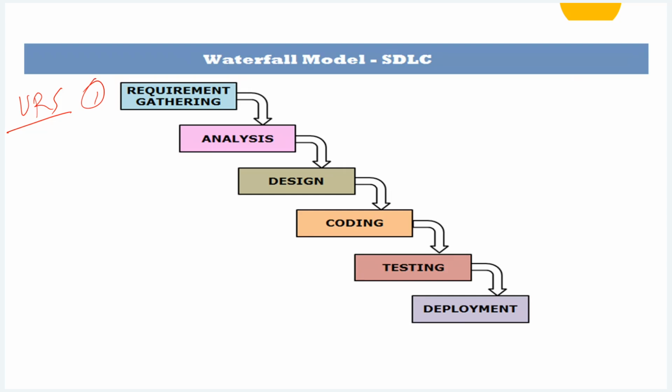That URS we are going to send to the vendor. The vendor will analyze those requirements. Then he will provide the design document, saying this is how the software will look, the designing of the software. Once you say okay, this is okay for me, they will code the software, they will develop the software. After that, testing of the software. If testing is successfully passed, we are going to release the software. We are going to deploy the software for what purpose? For operation purpose. Now people can use it in daily operation. This is what is called go live of the software.